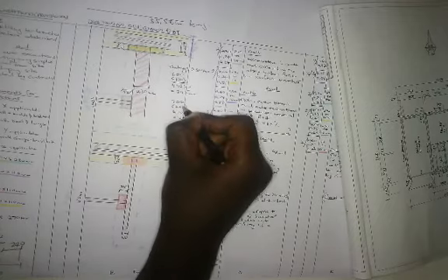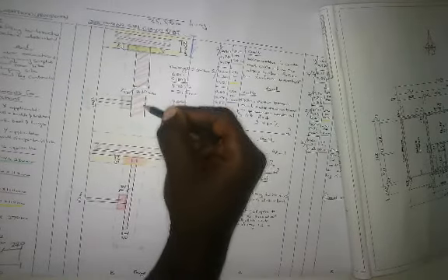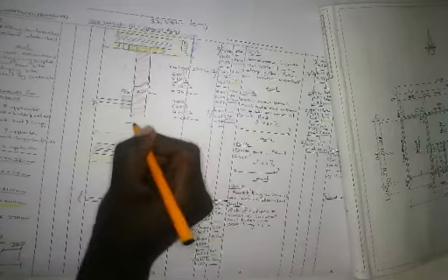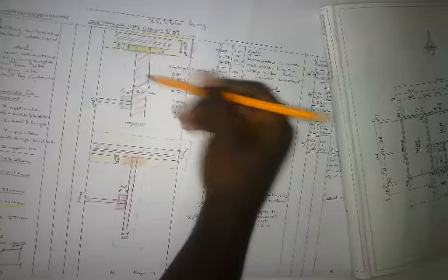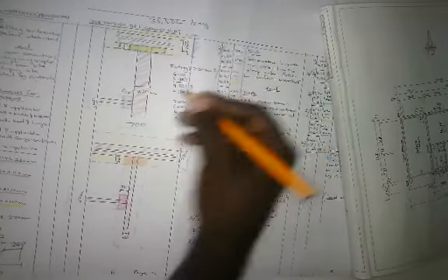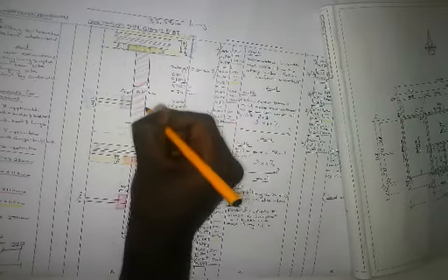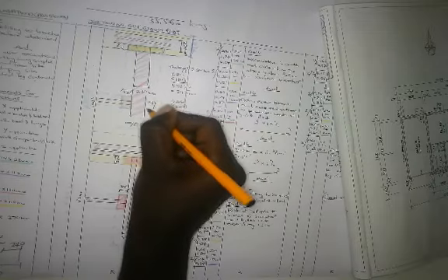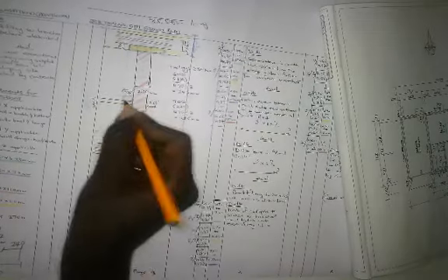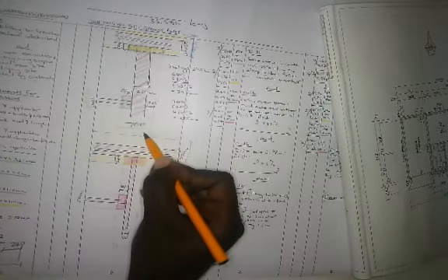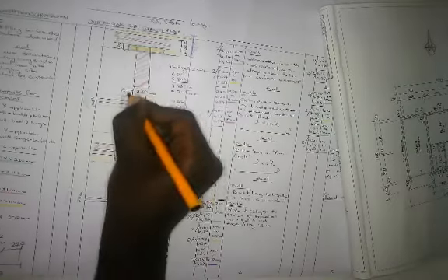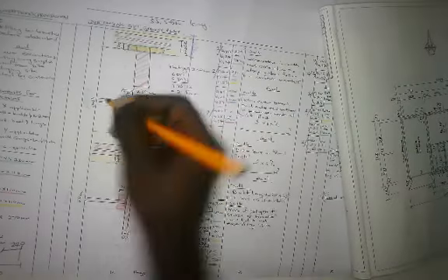So just grasp how we calculate when you are going to deduct for a T. For instance, where your 230 comes against your 110, you're gonna say 700 minus 230. Let me write it a bit clearer. 700 minus 230, and then you divide it by 2, and then you get 235.